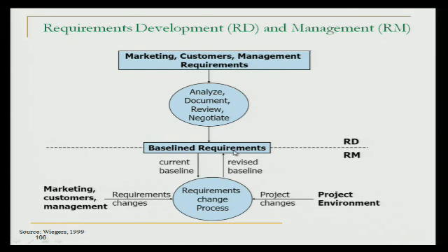And eventually you've got to put out a revised baseline. What would that revised baseline be? It might be new requirements. It might be changed requirements. It might be deleted requirements because you took my 3 people away and I'm going to de-scope the project. So there's a whole set of activities under here. And this might iterate backwards and forwards often.